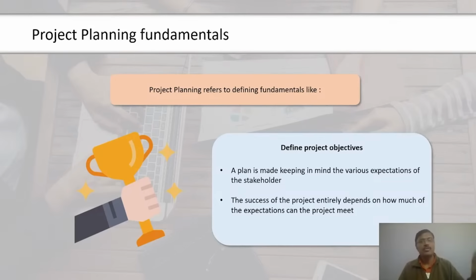In the next screen, let's look at the define activities process. Define activities is the process of identifying the specific actions to be performed to produce the project deliverables. It belongs to the planning process group. The important input for the define activities process is the scope baseline. Scope baseline is a term used collectively to refer to project deliverables, constraints, and assumptions of the project. In addition to the scope baseline, the other inputs in this process are enterprise environmental factors, organizational process assets, and schedule management plan.